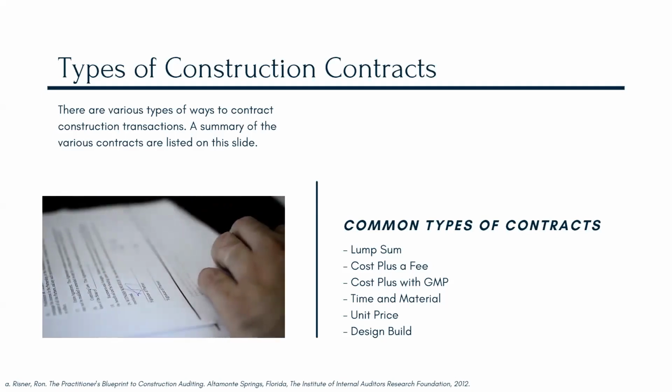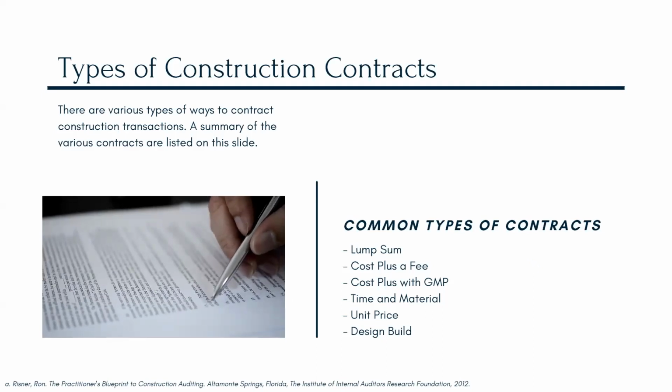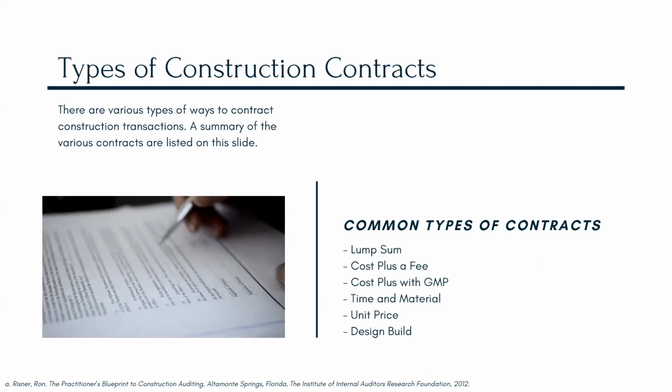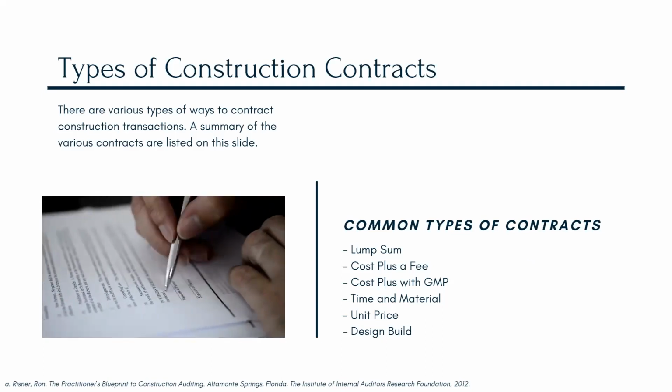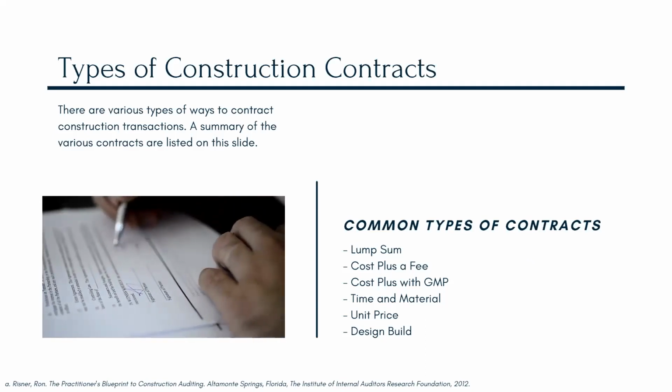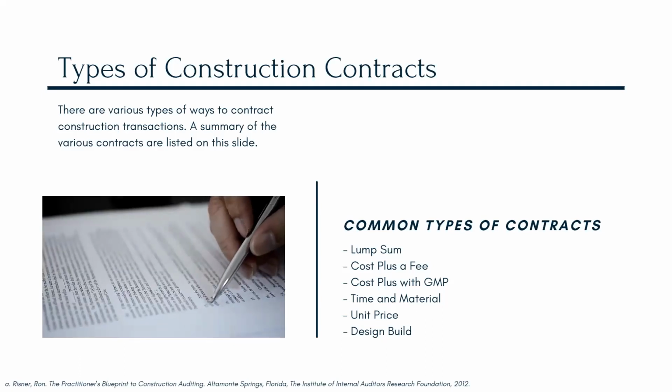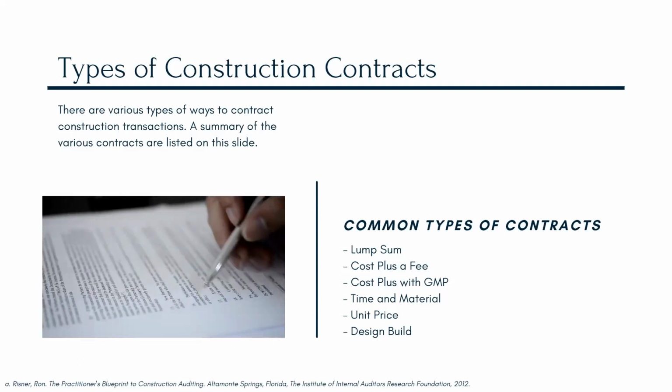One of the other risks to a cost plus is that the general contractor, depending on the nature of the general contractor, if they are the type of contractor that spends a lot of money, that can drive the costs up a lot for the project, and the owner loses a lot of control, and that certainty of what the final amount of the project will cost is not there until the project is all but complete.